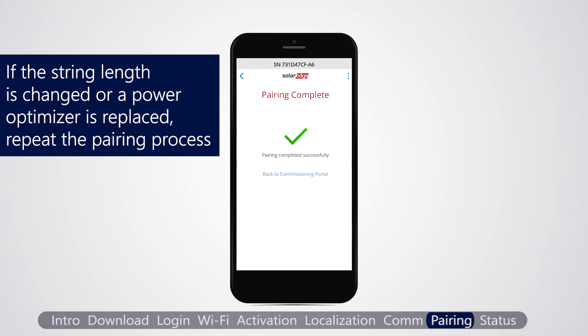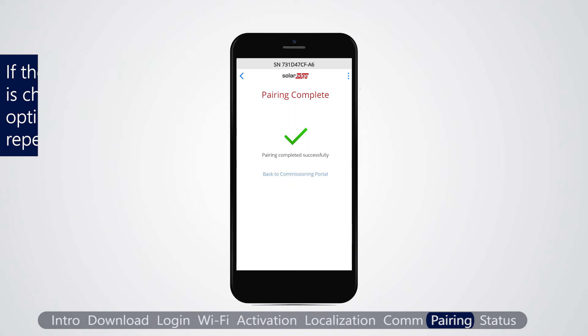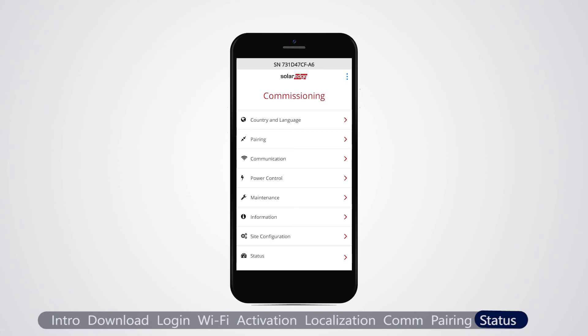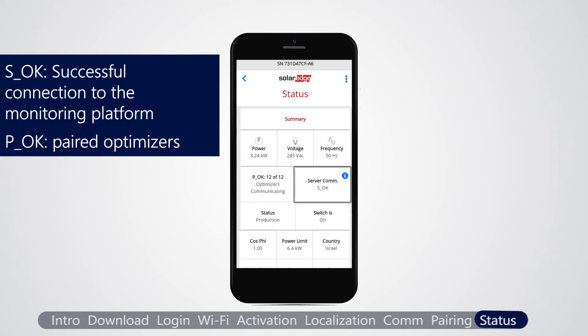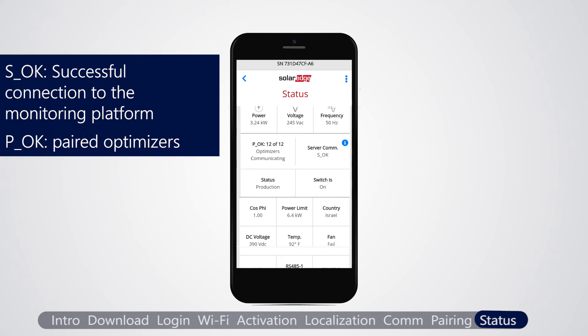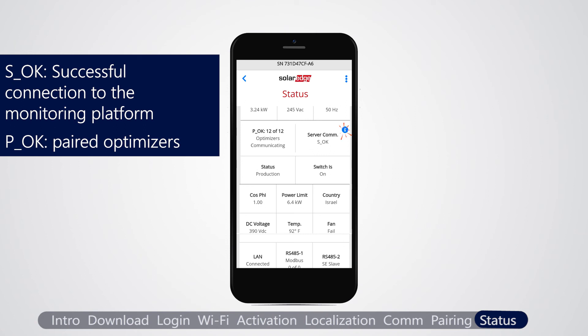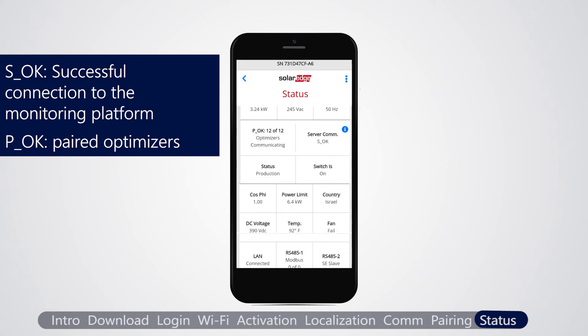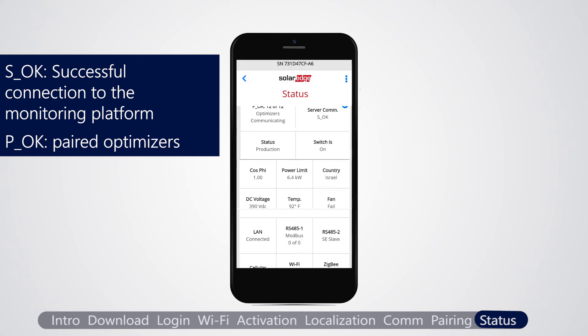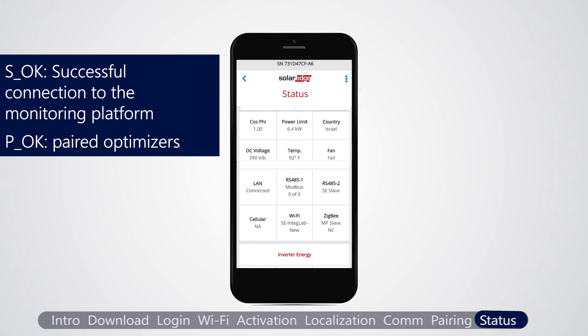Tap back to return to the commissioning menu. Verify that the connection to the monitoring platform was established successfully. Select status and verify that SOK server connected appears. The site status screen shows the status parameters of all slave inverters on the same RS-485 bus. The master inverter parameters are displayed first and then the slave inverter parameters.